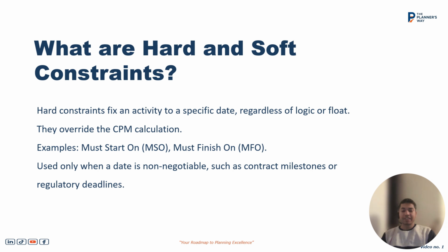As they have the capacity to override the logic, we need to avoid them as much as possible. But if needed, we have to keep them in and properly document and manage them. They are used only when a date is non-negotiable, such as a contract milestone, regulatory dates, or any obligatory dates, or the project completion date.